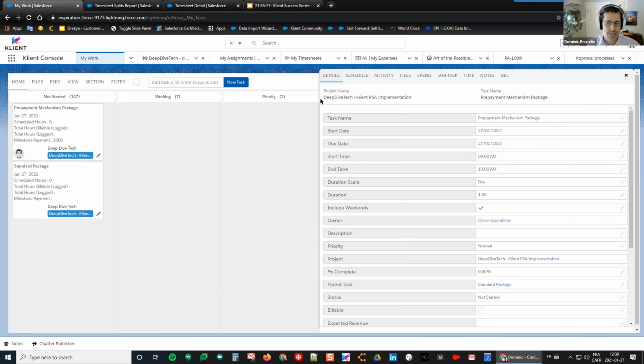So whenever service is delivered, then we invoice. That means that we could have a variable or a moving date, depending on the project plan, whenever this occurs. In that case, we would be using a milestone because it's something that can live with your project plan.